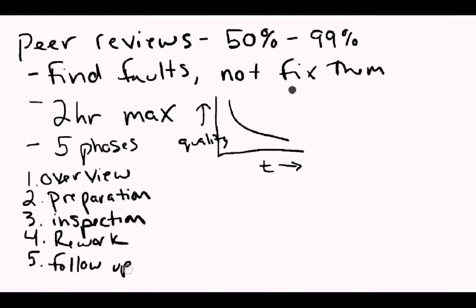So if we had this list of defects, we want to make sure the author actually went and fixed each and every one of those defects. So there's somebody in charge, that person's called the moderator, and he will basically look at the list of defects, he'll look at the old code, and he'll look at the new code to make sure that all of those defects have been fixed.